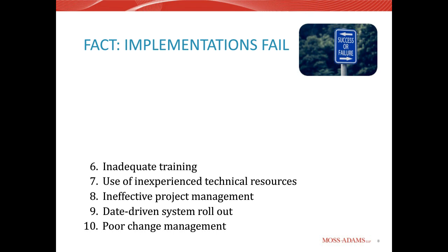And there's nothing wrong per se with this approach, because if they are well trained, these internal trainers can provide first level support to all other end users. But given that these trainers will be new to the system themselves, it is imperative that your organization invest in fully training them. You should review the project scope carefully to ensure that adequate time is devoted to training your business process leads.